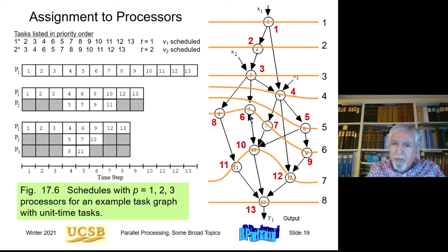The reasoning being that this is required for executing more tasks at the next level, therefore let's do this as quickly as we can. Now in this case, let's say each of these in level 6 is a prerequisite for only 1 task in the next level, so that rule doesn't help. So whatever tie-breaking rule, I assigned priority 6 here, 7 here, 8 here, 9 here.